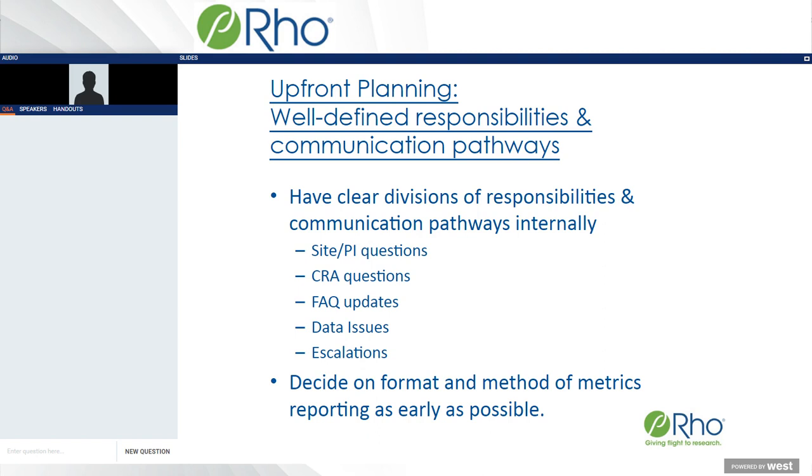Obviously, throughout the trial, you try to maintain a frequently asked questions log. Much of this comes at the beginning of the investigator meeting, and then you add to it as your study goes along. But this needs to be updated on a very frequent and regular basis and then disseminated to the sites quickly. So who will be in charge of making those updates? Will there be a QC process? Who's going to be in charge of that? And then so on and so forth. Who's going to send it to the sites? Where will it be posted, or is it going to go through email? So all of these seemingly tiny details are important when time is very short.